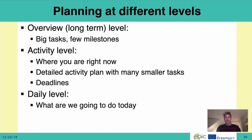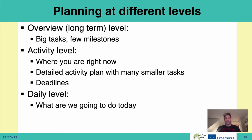You can plan at different levels. At the overview, long-term level, you have a big task and a few milestones. When you get to the activity level, you detail out the activity plan with many smaller tasks. But this can be difficult or even meaningless to do from the beginning, because you don't know the detailed activities before you get there. And of course, also at daily levels — what are we going to actually do today?